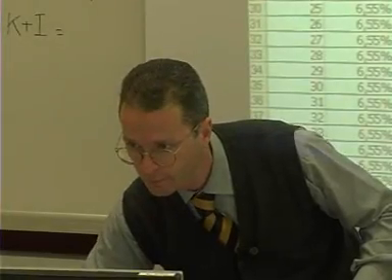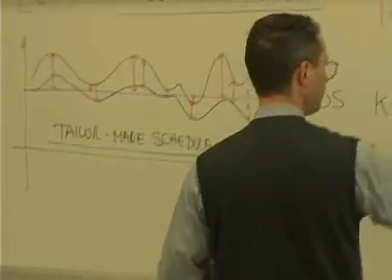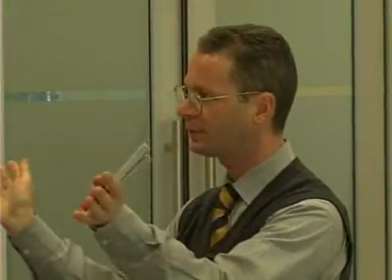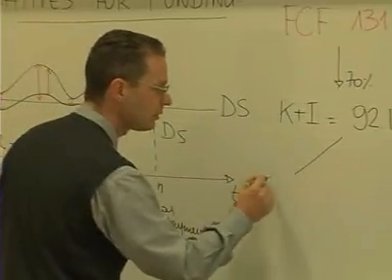And you can see the debt service column, whose value is 92.17. Pay attention to one fact: 92.17 is the sum of the reimbursement and interest. So our problem now is to split this amount into the two basic components, the interest and the capital repayment. How to do it? It is very simple. Interest: we must keep in mind that interest is calculated on the outstanding amount of the previous year or previous semester times the interest rate.